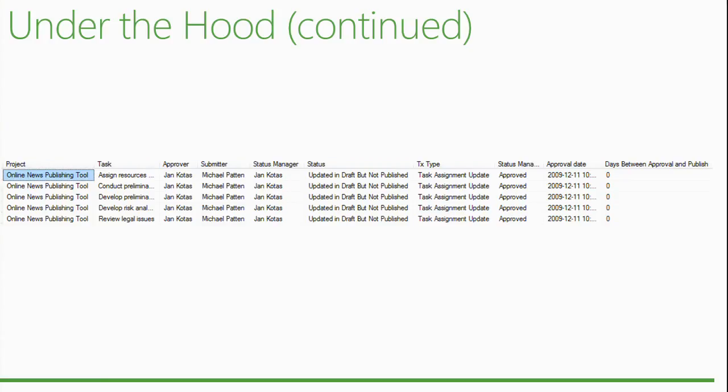All right, well, but you didn't submit it. So it was never sent to the approver, and it never started the workflow to push the data through the various roles. Another thing is, I submitted my updates, but the project manager or the status manager never approved them. So they are still stuck there in some table in a transition state, waiting for the approver to follow the process and do what they are supposed to do.